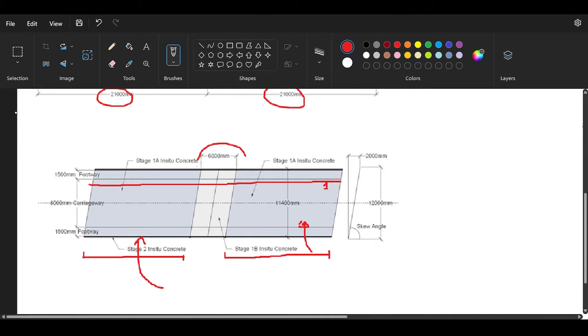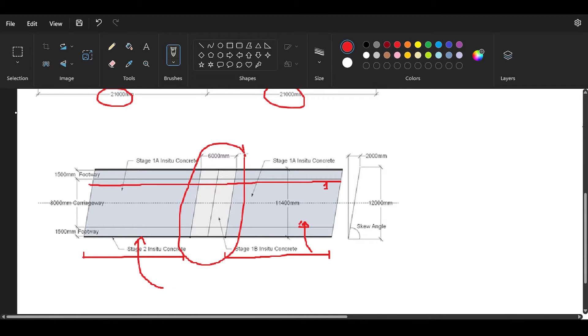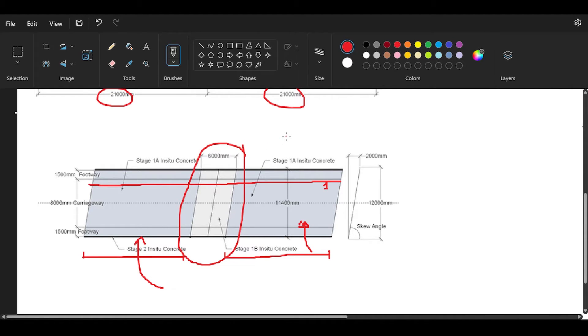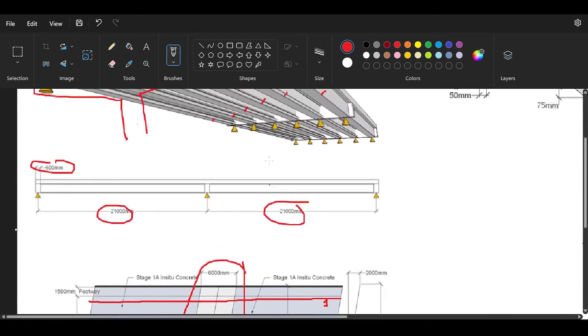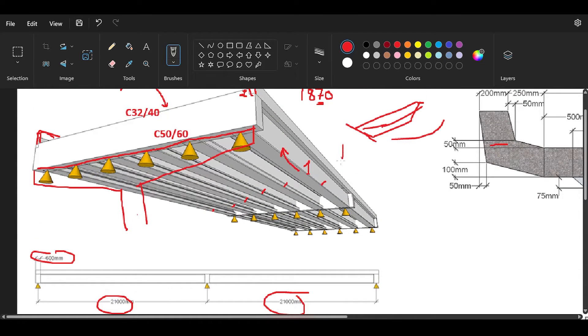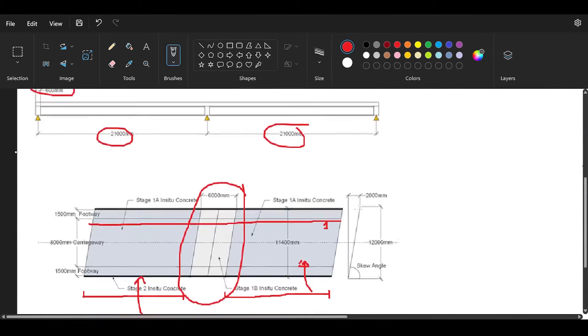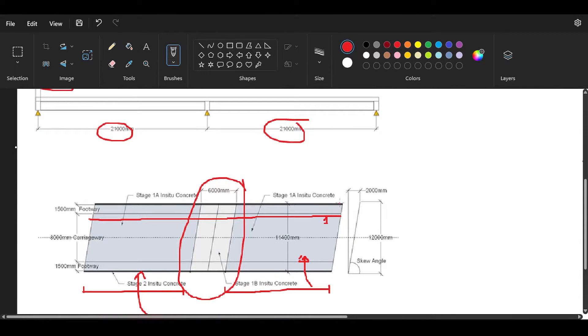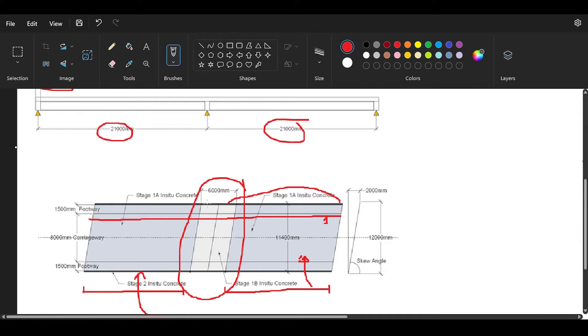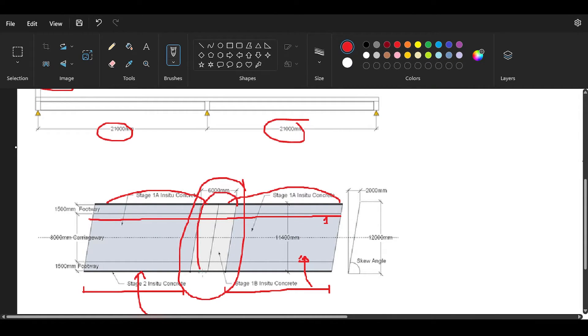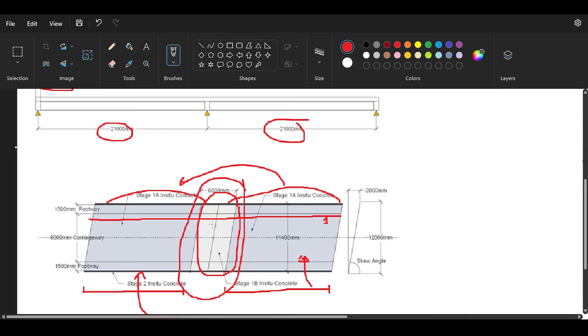Then we are going to cast 18 meters of concrete here and 18 meters of concrete here. So we're going to cast this slab and that slab. Those two slabs are cast as stage two, or stage 1A, and then we're going to cast the central six meters. The reason why we're going to cast the central six meters is because of practical considerations. There are a ton of issues I need to discuss here.